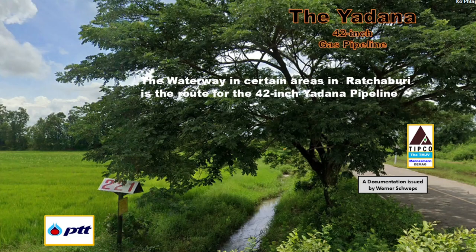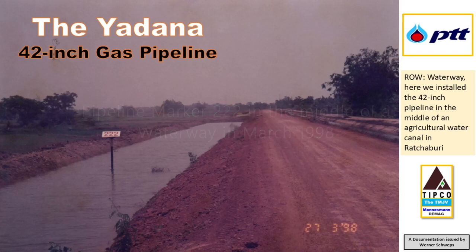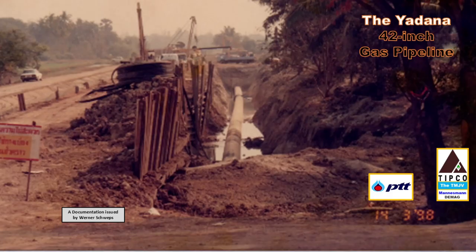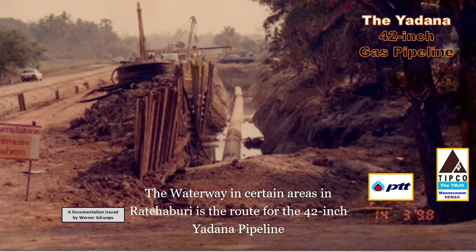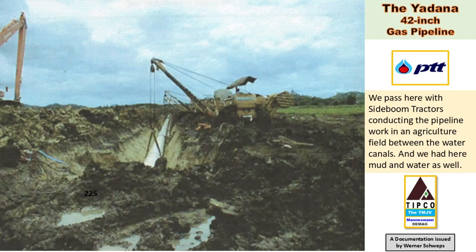Between pipeline kilometers 220.5 and 226.5, the pipeline runs inside water ditches used for agricultural purposes. The installation of the pipeline along this approximately 6-kilometer waterways, with some interruptions through agriculture fields, was quite different from our standard pipeline construction. The picture presented here shows us the passing of our side boom tractors during the lowering